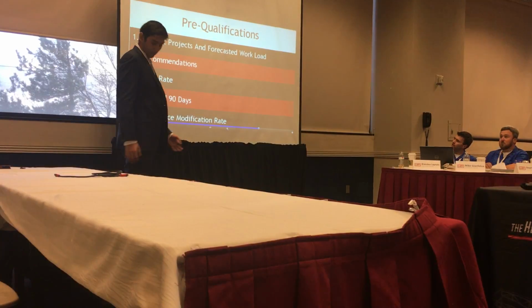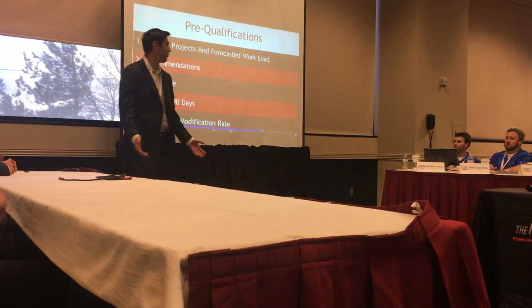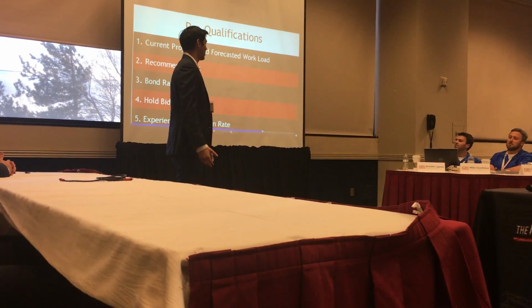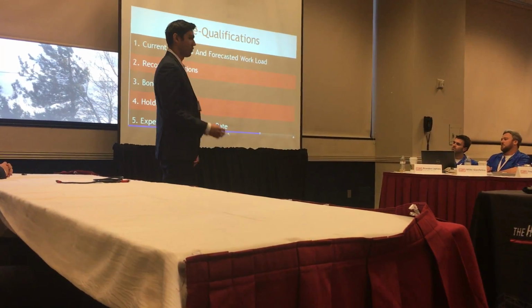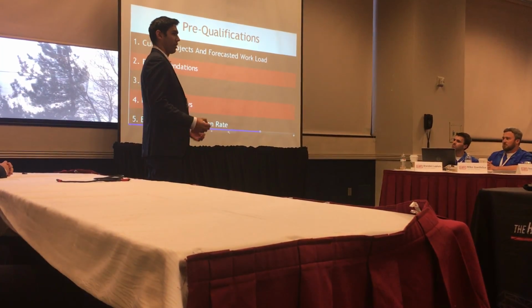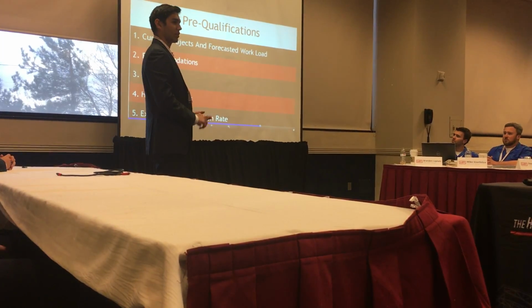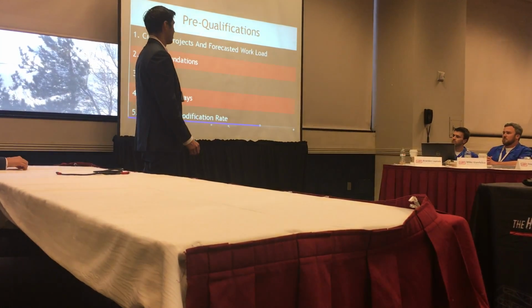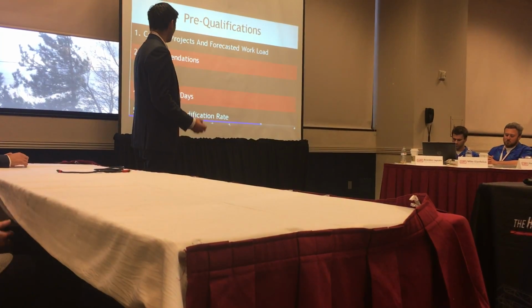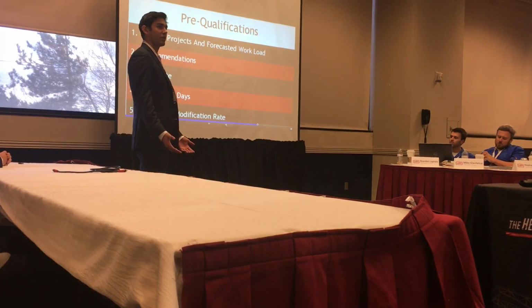We all know that when it comes to subcontractors, it's always that 10% that usually takes about 90% of our time. So what we wanted to do, and make sure that we do on all projects, is to not only pick the lowest, but the most responsible and most reliable bid. In order to ensure that, we have a list of pre-qualifications that we give for every bid invitation.